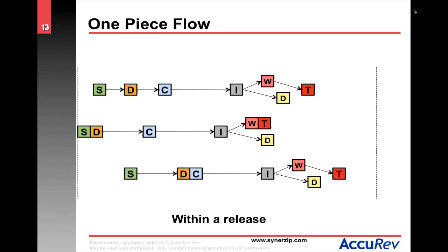Spread out over time. Now, why does that really matter? And I sort of hinted at that the economic value that you're expecting. If you build a feature very rapidly and show it to somebody, and they say, I have no interest in that now that I see it, you may be able to avoid doing more in that feature area now. And that will save you time.